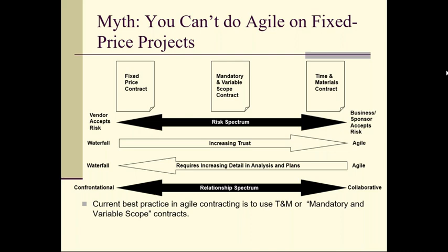They absolutely are gaining more popularity. You're right. Traditionally, owners or buyers like the fixed price contracts because they can manage their risk of going over budget. But what happens is, say the work is going to cost X dollars. By asking for a fixed price, I'm automatically paying more than X, right? X plus some risk contingencies in case things go wrong, because that vendor has to cover themselves in case everything goes to heck on the project.